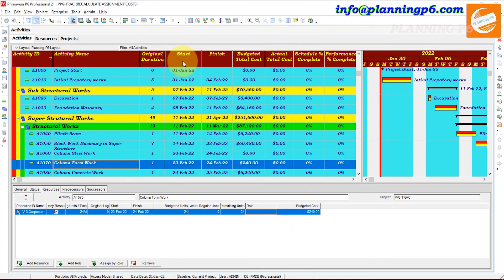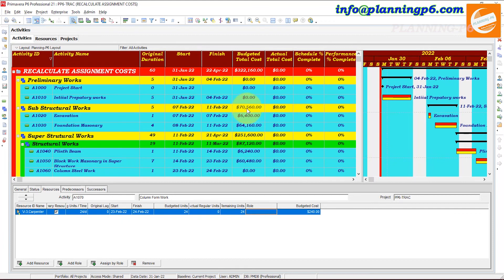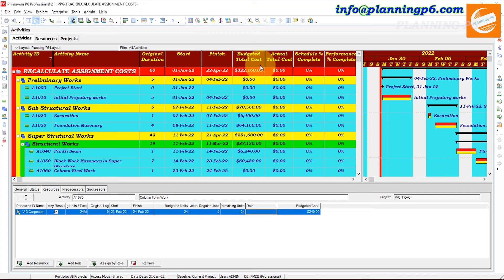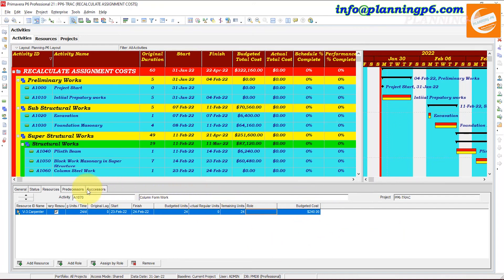And in the tools, recalculate the assignment cost. You can calculate it. If you did not use that option, then it will not update your budgeted total cost and the figures will be wrong at the end of the day. So this is how we can use and manage our costs for the resources. This option especially designed or added for this specific recalculation for the budgeted cost.